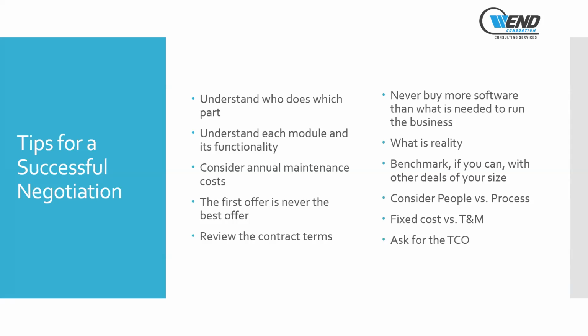We also want to make sure that we consider the people versus the process. It's amazing how often vendor project plans do not actually assign critical project activities to either the vendor or customer, or completely omit them. So we want to make sure inside of our change management activities that we get everything included: project plan, basic end-to-end user training.